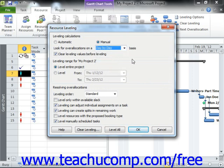Next, decide whether or not you wish to remove any leveling adjustments before applying the new leveling. If you wish to clear old leveling adjustments before applying the leveling adjustments that you are about to create, then leave the Clear Leveling Values Before Leveling checkbox checked.